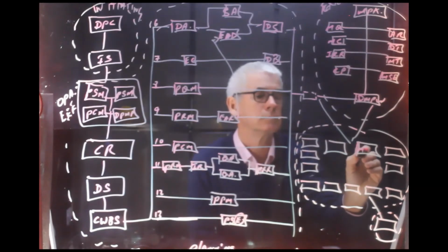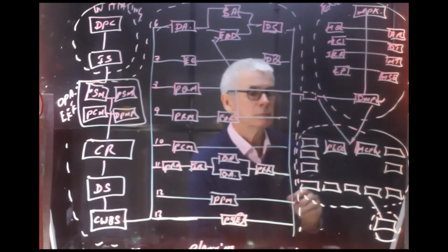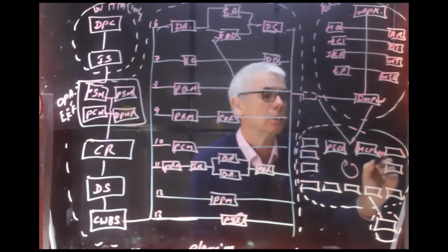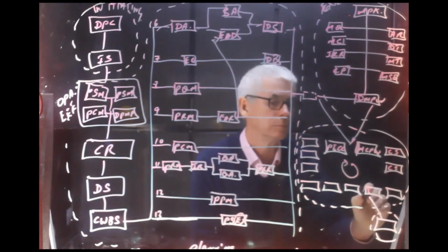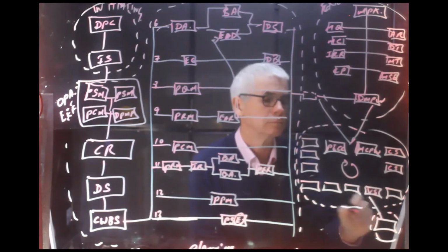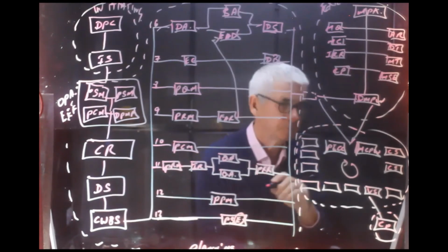So now we're in monitoring and controlling. So this is monitor and control project work. And then the other one, I suppose, in integration, perform integrated change control. Very good, so that's quite interesting then. And you kind of run around the knowledge areas now. So we have one for each of the knowledge areas and two for scope. So we control the schedule, control the scope, and then validate the scope. Validate the scope gives us acceptance of the deliverables, and then we can close the project.